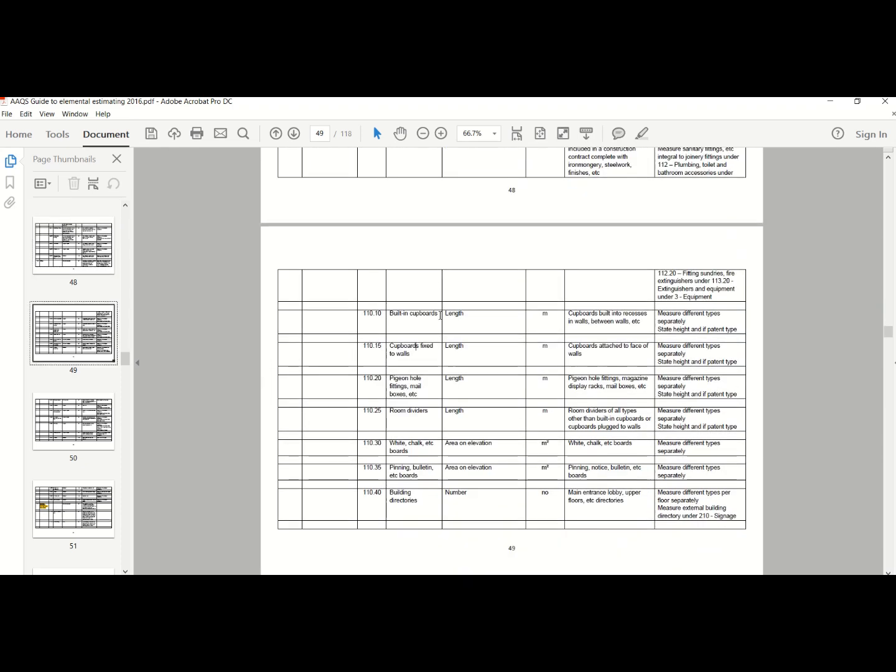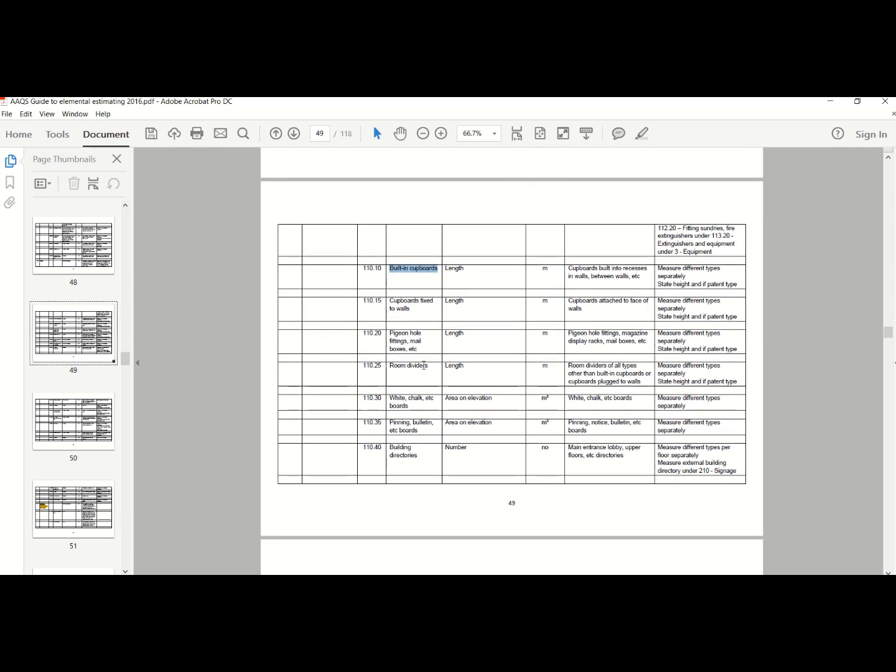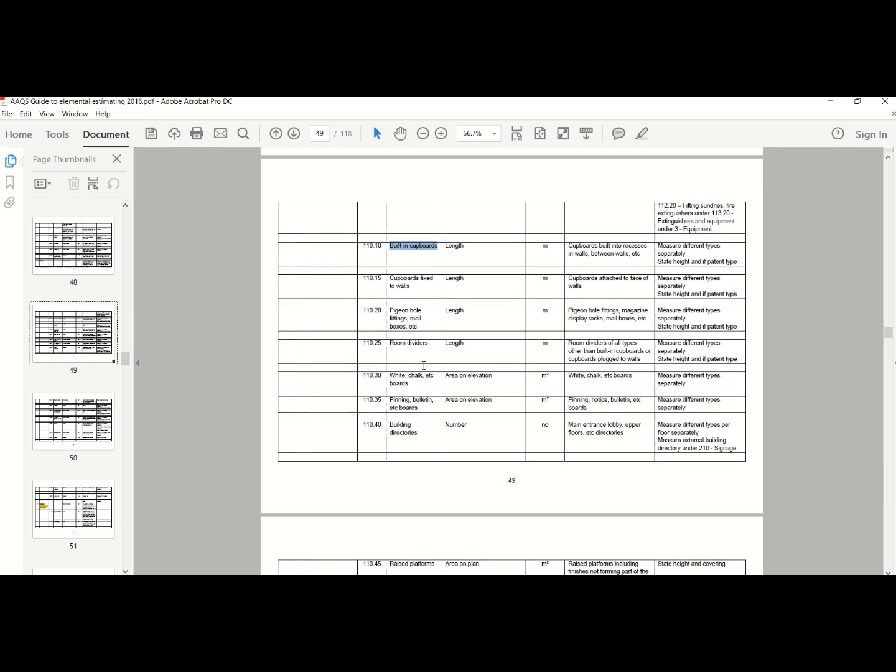Okay, so fittings like your cupboards: the main thing you need to remember here is that you should compare apples with apples. Wherever something is measured, it should not be included in any other rates that you used earlier on. Your cupboards are usually an easy item to measure. You just take a previous bill or cost of a building.